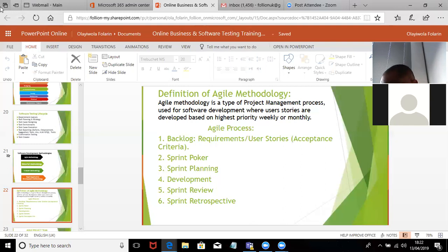Hello? I'm with you. In that process, they manually put a card within all the team. Everybody will have a card. They will discuss what the developer is going to do and how long it's going to take him. They will then ask everybody to table what they guess the number of days or hours that will take the developer to finish that project.